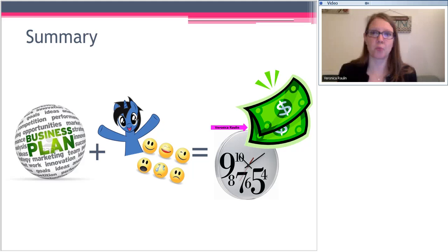But really when we look at the refreeze, what we're looking at are those bigger changes. So as you're developing, your refreeze is going to happen kind of when you close out that project or that new software implementation. Those mini changes, not such a key part, but even establishing best practices to make sure that every time you do a new release, you're communicating, doing some of those things, that will make your refreeze happen quickly. And the smaller the change, I think sometimes the refreeze is just not such a big deal. It can just happen really fast. But for a big project, you're probably talking more about when that system is really in its first phase.